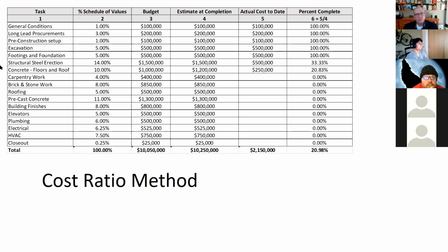The client works in reverse. If excavation is worth 5%, the contractor would want to get 6% or 7%. They want to get more money, right? The client, from their perspective, would probably want to pay 3 or 4%, because they're a little worried that if they pay Jose more money ahead of time, maybe Jose goes bankrupt or disappears on me. So I've got to worry about that. Or maybe if there are some problems with the building structure during construction, I don't have much leverage over him.